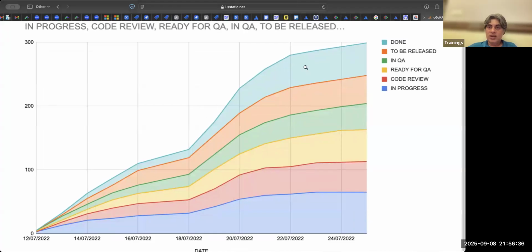So if you look at this, these are done. So done ticket got done is like flattened here because there is a pile up here. Then this is done from this point to this point is a very steep curve because see, nothing was getting piled up. This yellow was narrow, this green was narrow, this orange was narrow, but suddenly here there is a lot of build up here in the QA. So these are ways you can actually find your flows. In our Jira also it will show you like that.